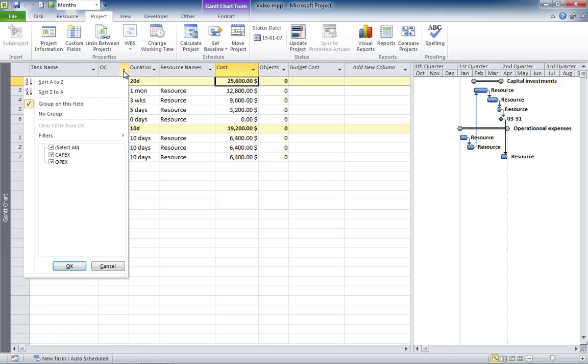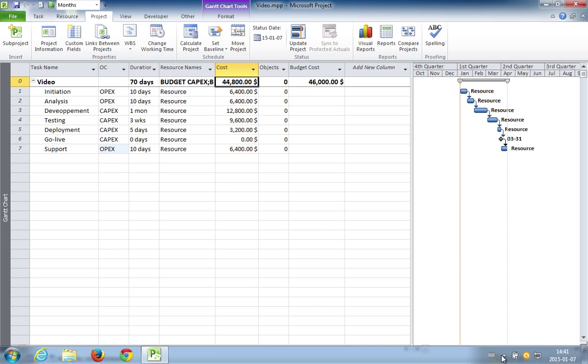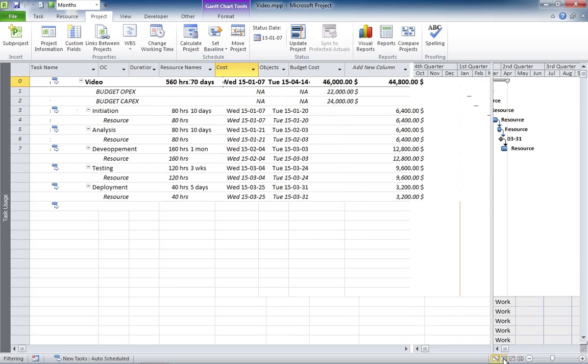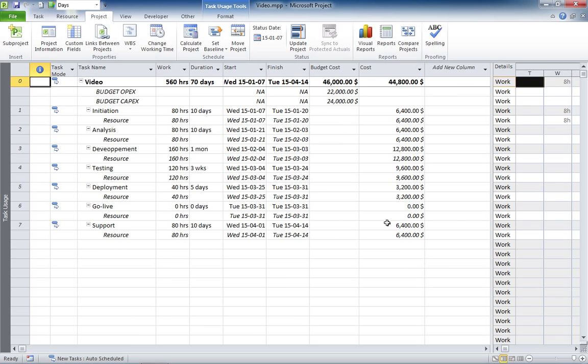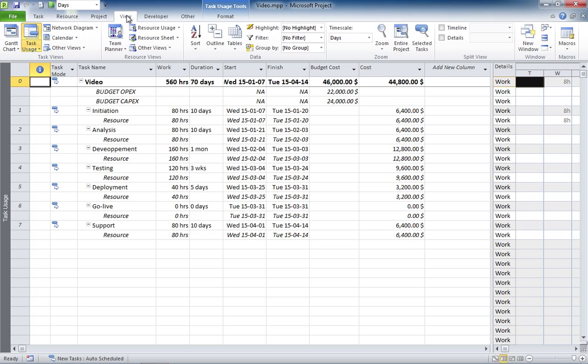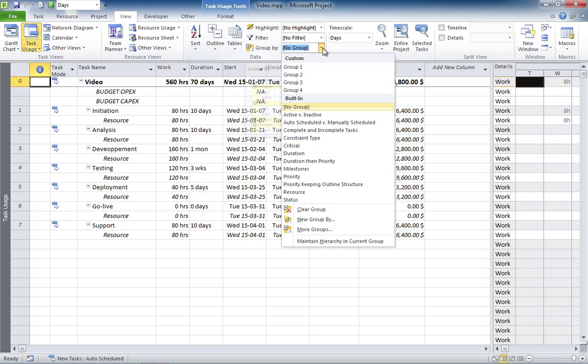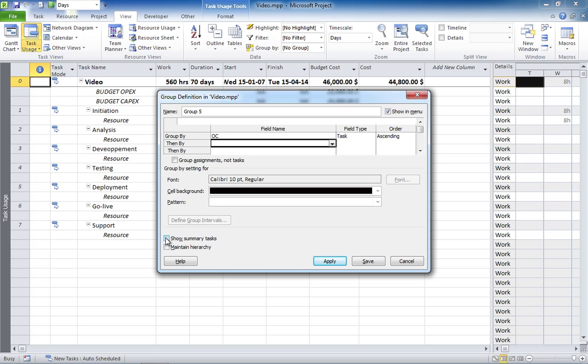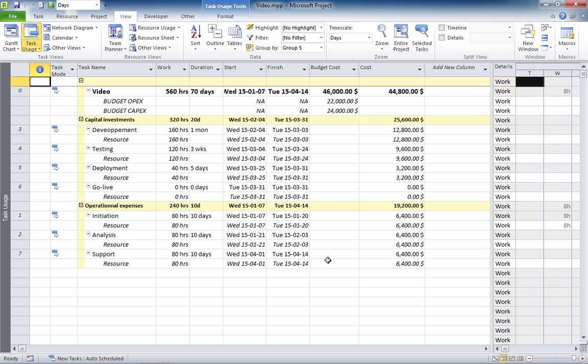Now, there's a better way to see more information and it's the task usage view. Let's go to the task usage view here. So, you're going to create a new group, a new grouping here. New group by. And you're going to group by the field OPEX CAPEX, of course. And you're going to select here Show Summary Task and then Apply.